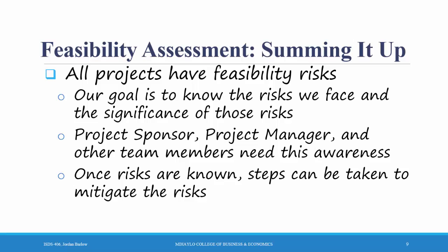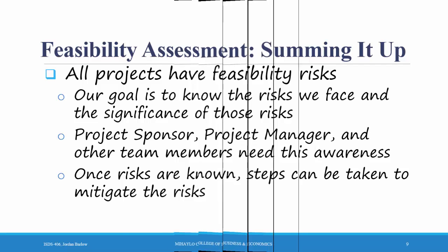For example, if one risk is that your organization is not familiar with a new technology being implemented, you can take several steps to mitigate this. You can provide a budget for training. You can provide a budget to hire consultants who do have expertise. You could allow more scheduling time in the project to allow for a learning curve, and so forth.